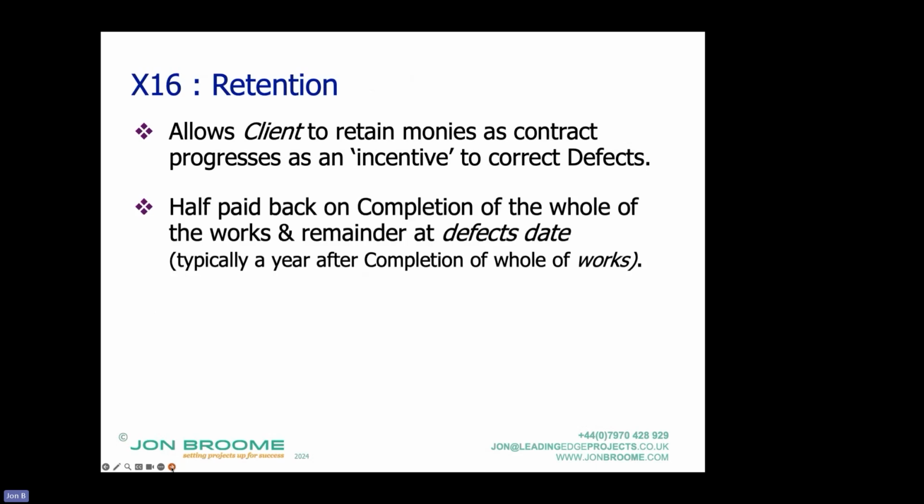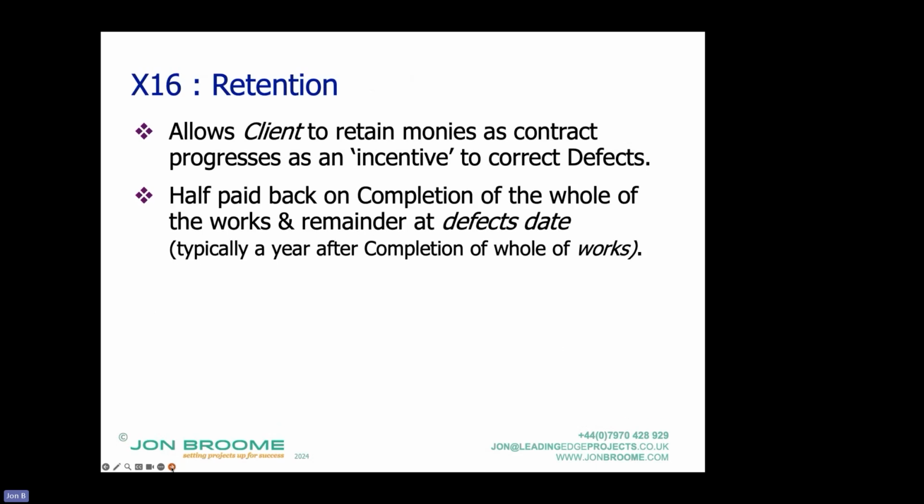Retention is X16. It allows the client to retain monies as the contract progresses as an incentive to correct defects. As in, if you don't come back and correct defects, we'll take money from this fund. But when you achieve completion, and at the end of the defects state, typically a year after completion of the whole of the works, we'll pay back the remainder.